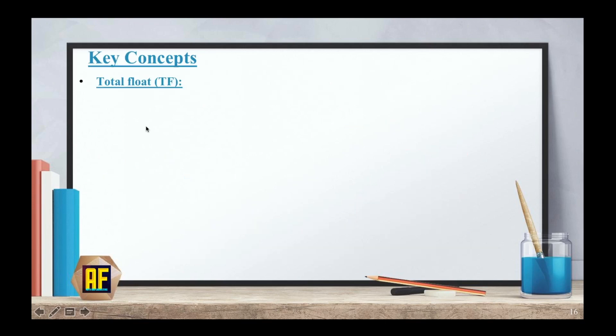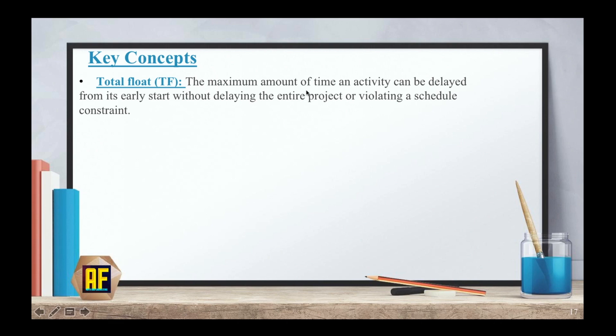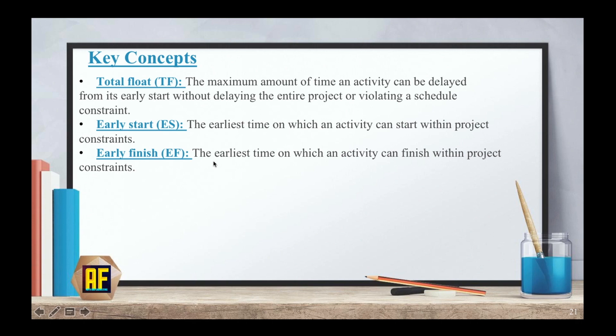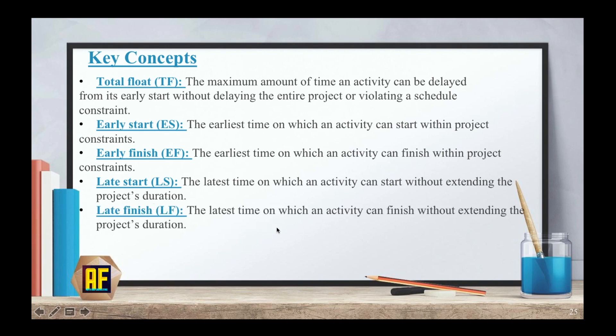Now, here are some key concepts. Total float: the maximum amount of time an activity can be delayed from its early start without delaying the entire project or violating a schedule constraint. Early start: the earliest time on which an activity can start within project constraints. Early finish: the earliest time on which an activity can finish within the project constraints. Late start: the latest time on which an activity can start without extending the project's duration. Late finish: the latest time on which an activity can finish without extending the project's duration.